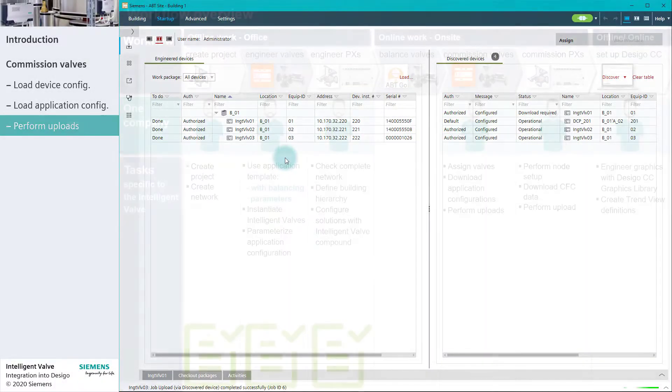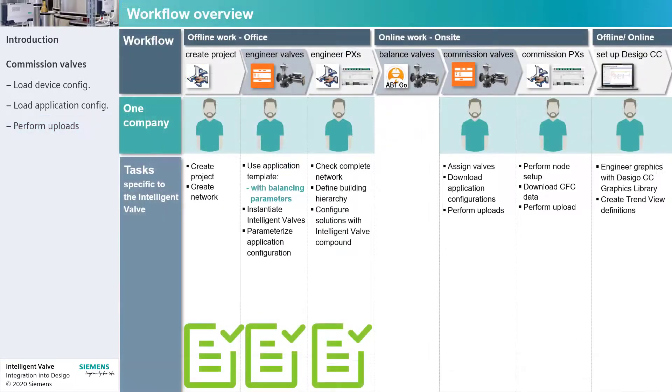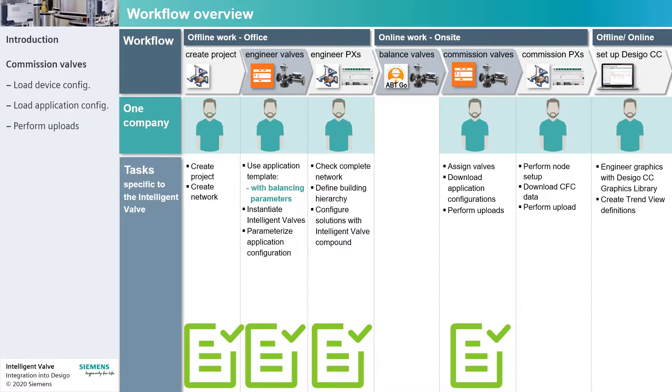Commissioning of the intelligent valves is now complete. In the last stage of the project, we would commission the PX Automation Station and set up Desigo CC.